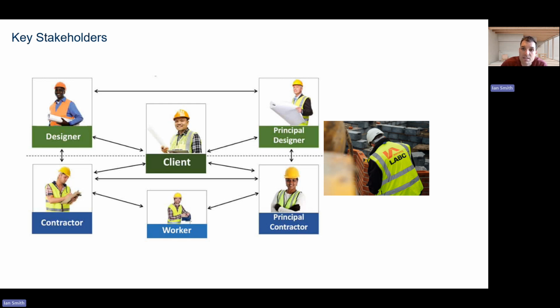Our key stakeholders and their influence. The project requires consultation with several key stakeholders who influence the design, safety, and delivery of the project. For example, our client, in this case a commercial developer, is responsible for funding the project and defining the overall requirements for the restaurant build. Their influence includes approving the budgets, timelines, and design specs, and their decisions can affect the scope of our restaurant project, their procurement strategies, and our overall program.